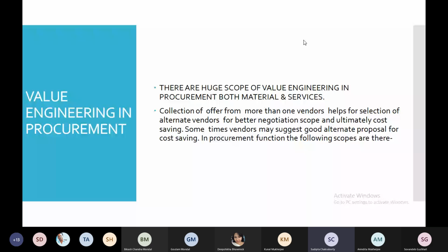So, is there any chance? For Heavy Water, we can get vendor approval. That is not a problem. But EIL is very restricted and conservative in giving approval for a fresh vendor. So in this way, we cannot go further, no? In some cases of EIL projects, we found a non-approved vendor giving a lesser price, but we are unable to get approval from EIL. So it is very difficult to give any value-adding service for this kind of collection of offers, basically in government tenders.